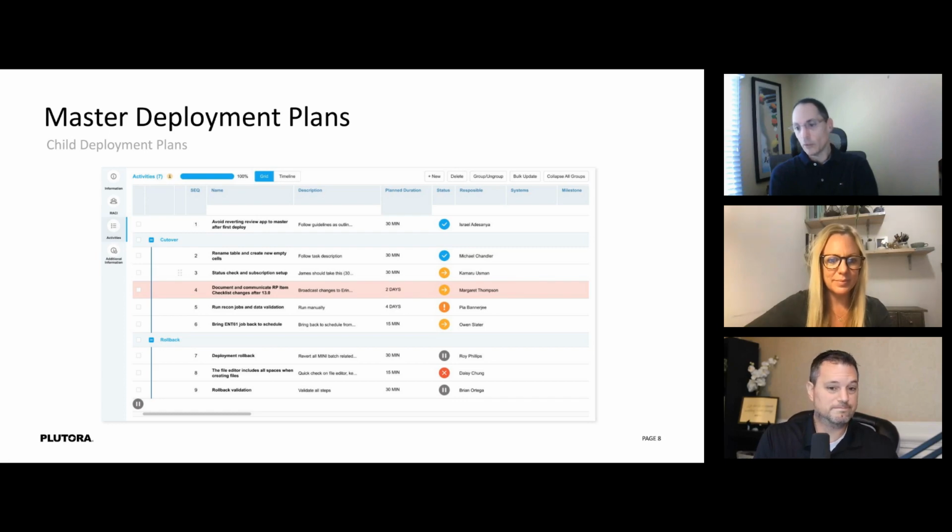Yep. And the other audit trail we have, Helen, and again, it's our internal process, is that we don't allow things to be added after it's approved. So if you want to add things on the fly during the release, you need the release manager to work with you. Once we identify that, we raise it as an issue that we come back to in our retros, which we do after every release. We ask, what happened? We had X number of things that were missed and had to be added during the release. How do we fix that? How do we improve that process next time?